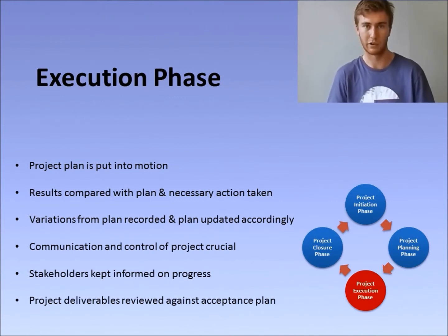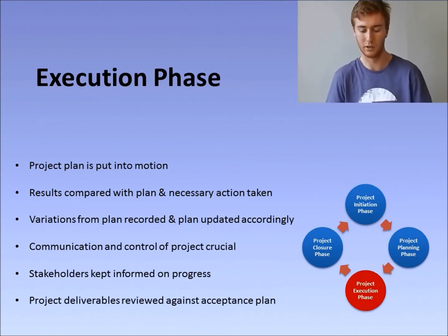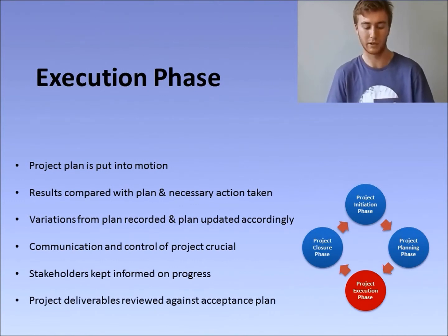For example, if construction has to stop due to wet weather. The project plan should be updated regularly to account for variations from the project plan. To keep on track, it is crucial that the communication and control of the project is maintained.